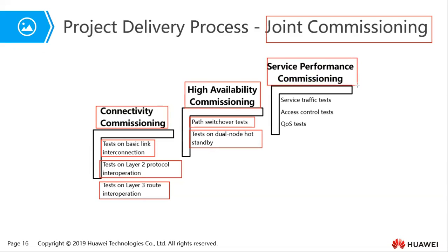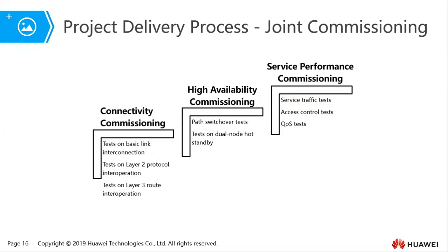The other thing you need to consider is service performance. So you need to check the service traffic tests, access control tests, depending on how you've configured your policies, and also quality of service tests to ensure that the service is running as per the requirement.